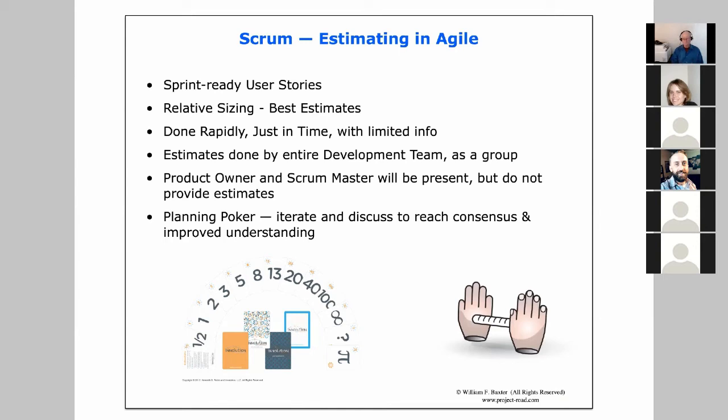Real quickly, the different point scale there, they aren't picking at random. They're just picking the number that they think it'll take, as far as how long it'll take to finish the sprint? Yes. Okay. Definitely. Yeah, if I indicated random, definitely not. No, they're picking. One guy might feel this is an 8, one guy might feel this is a 20, and the difference is because they understood the user story differently, and now they need to get some clarification from the product owner before they're going to be able to converge.